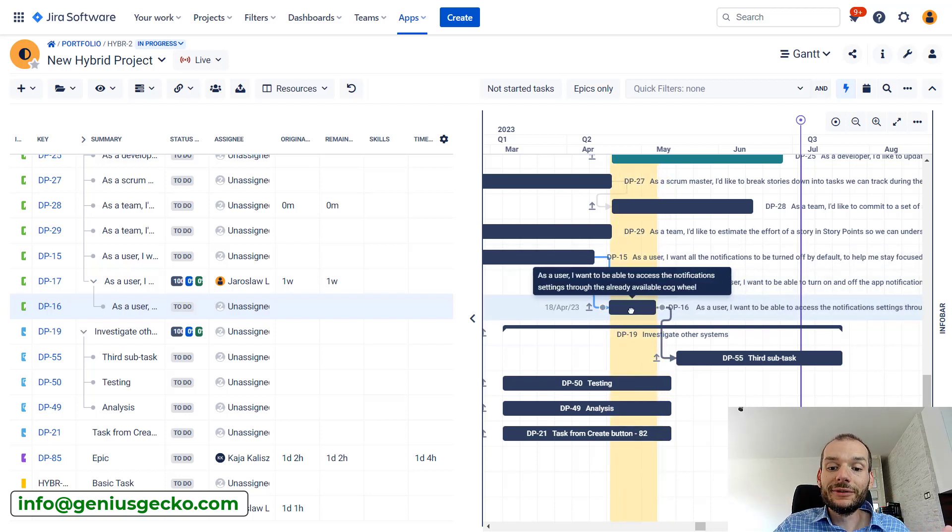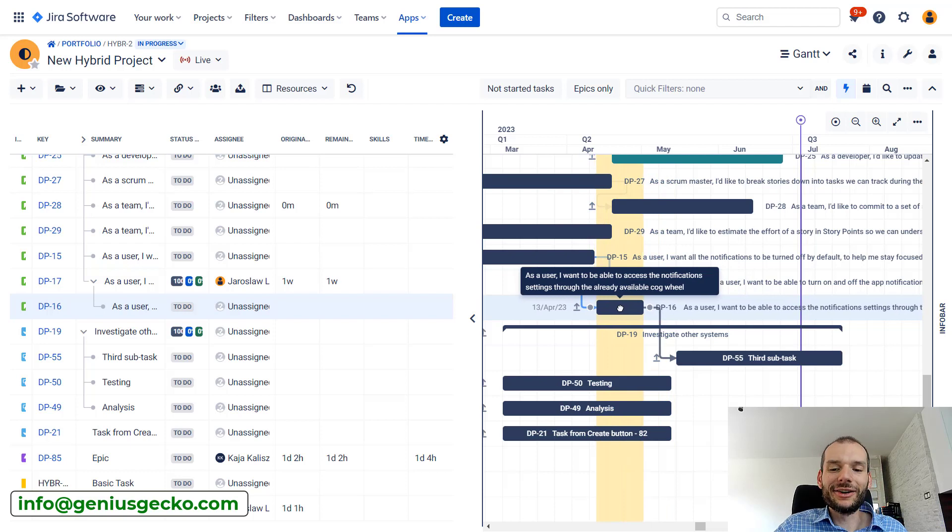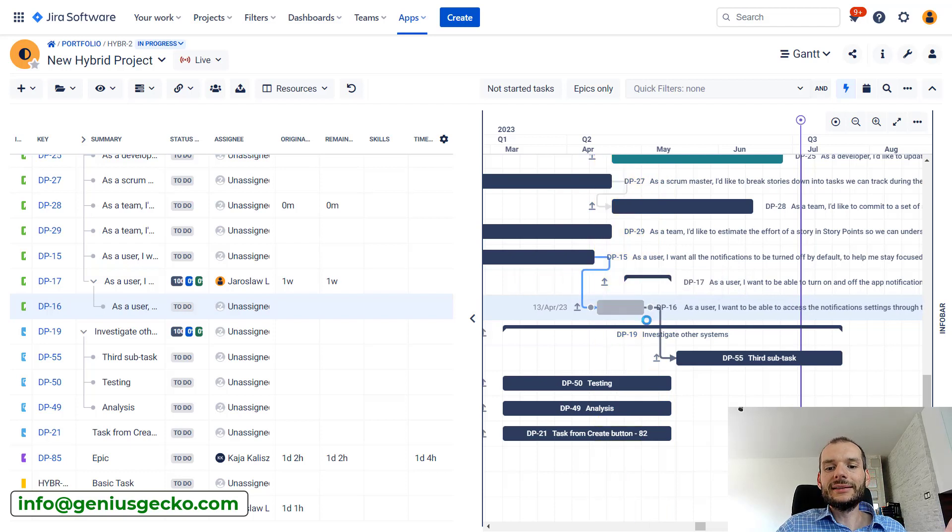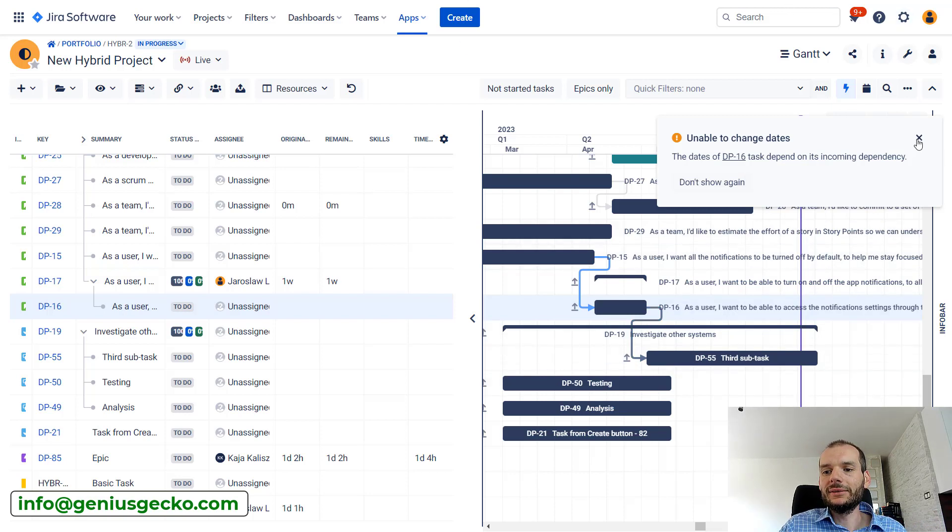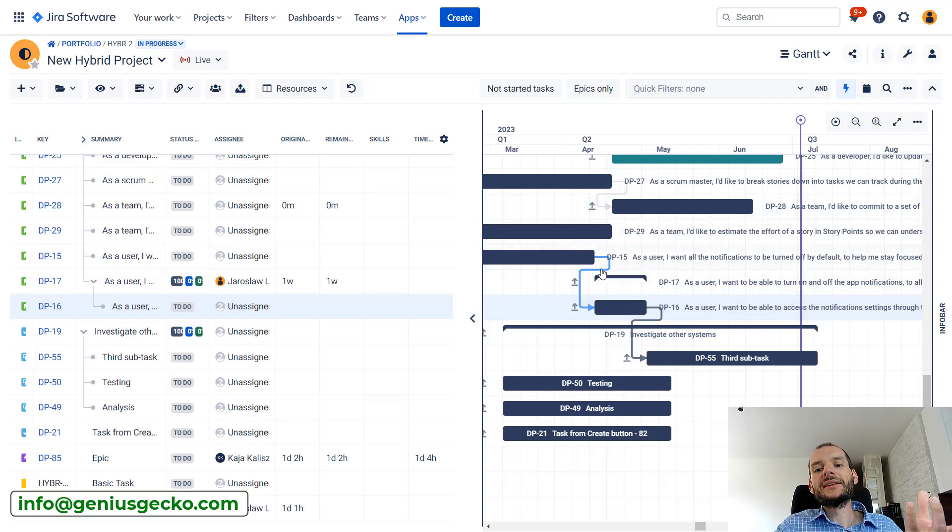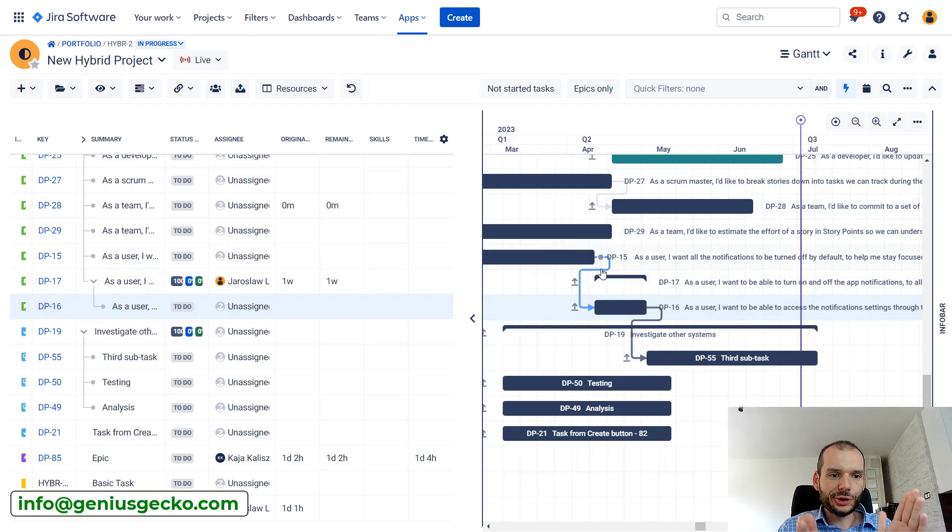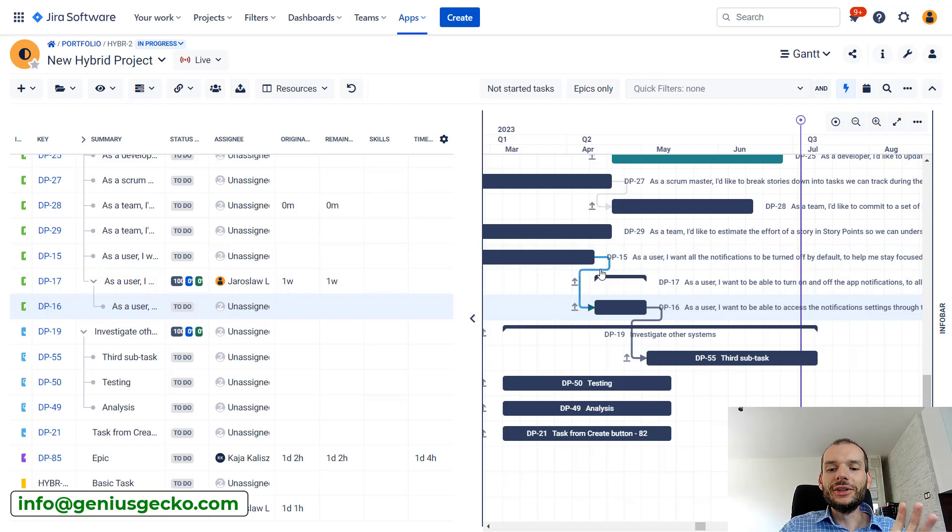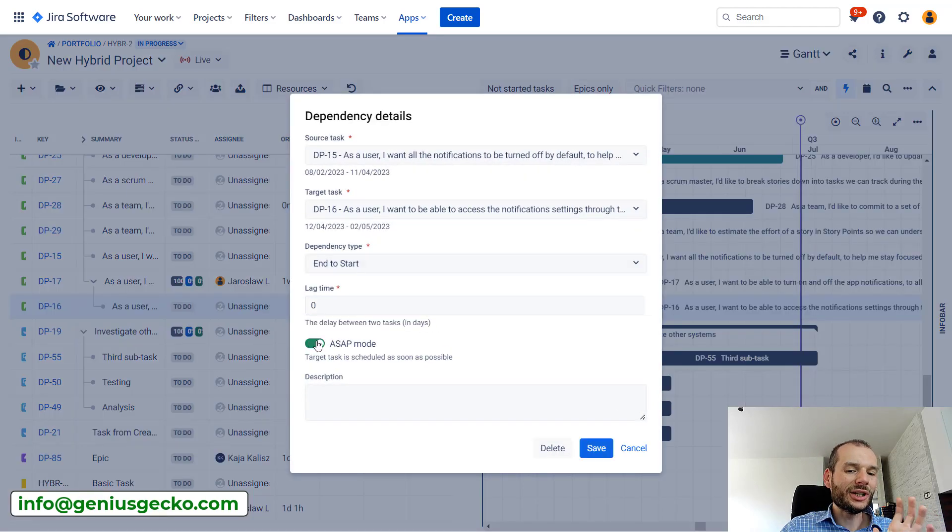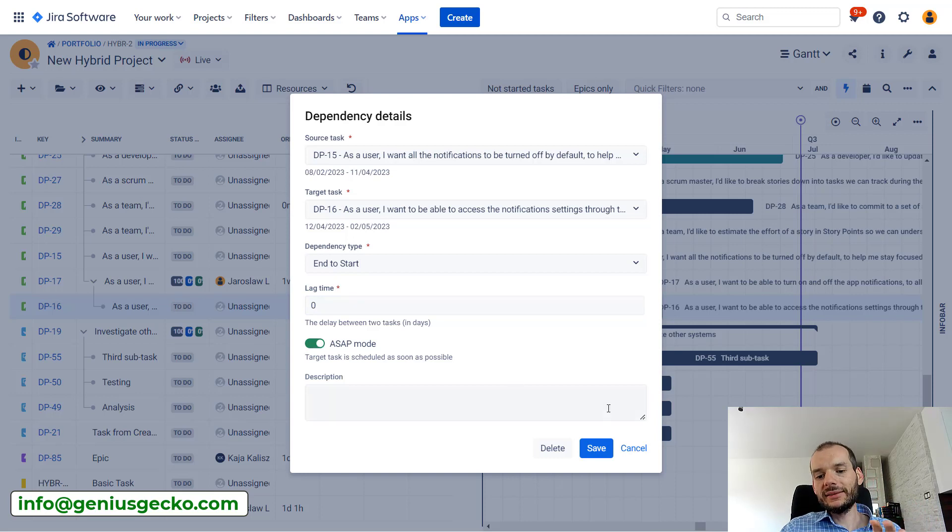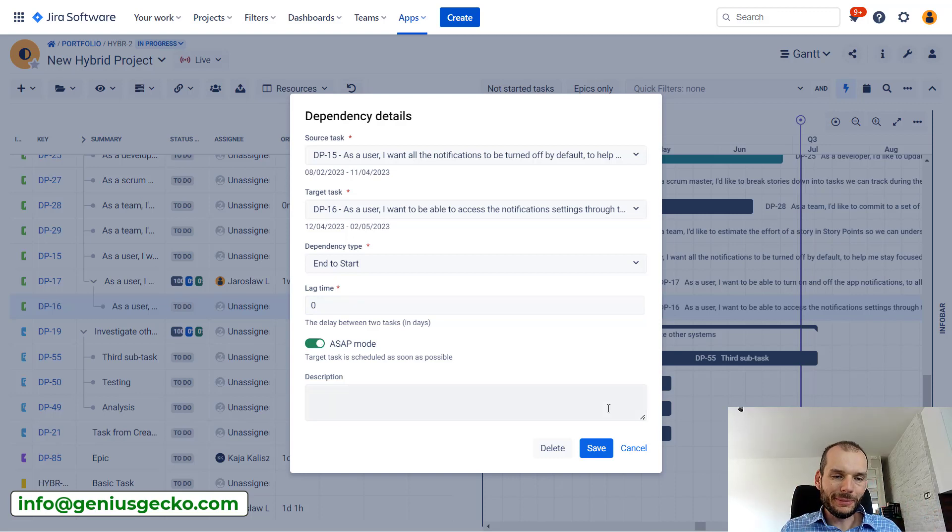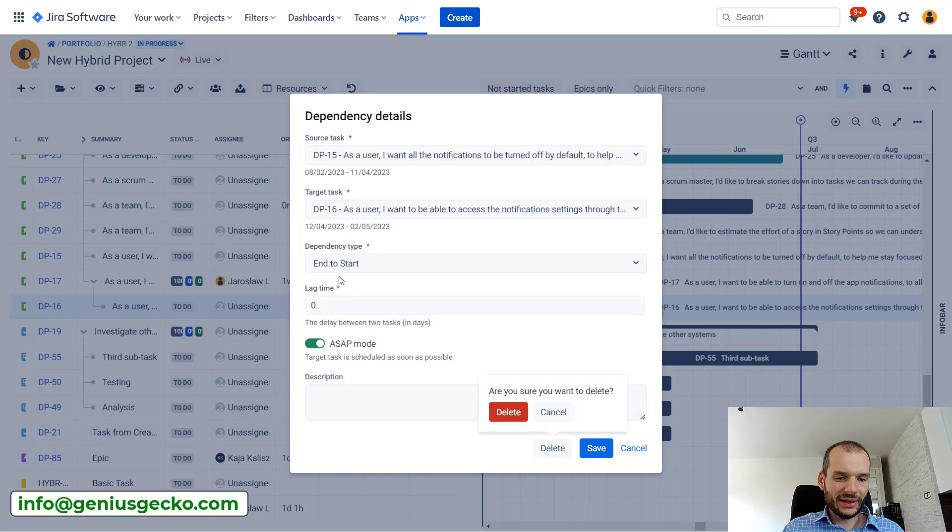So maybe we want to have non-ASAP mode and we want the dependencies to be non-ASAP. But very often that is not the case. Very often moving tasks slightly on the timeline won't automatically over-allocate resources. In that case, having this non-ASAP mode can be a bit not optimal. We want to deliver work as quickly as possible, considering that in the future there might be some delays.